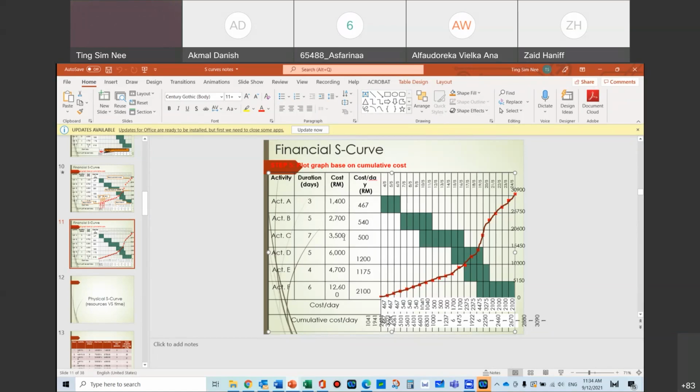2,100 plus 20% of this is 700. So in total, how much has been spent? I mean, the budgeted cost of work performed. So for the work that is performed, what was the budget for it? You just have to punch it in here. Is it under or above? It should be under, because this is a lot under, you see. You're supposed to have done a lot more, but you're actually under. So you put it under.